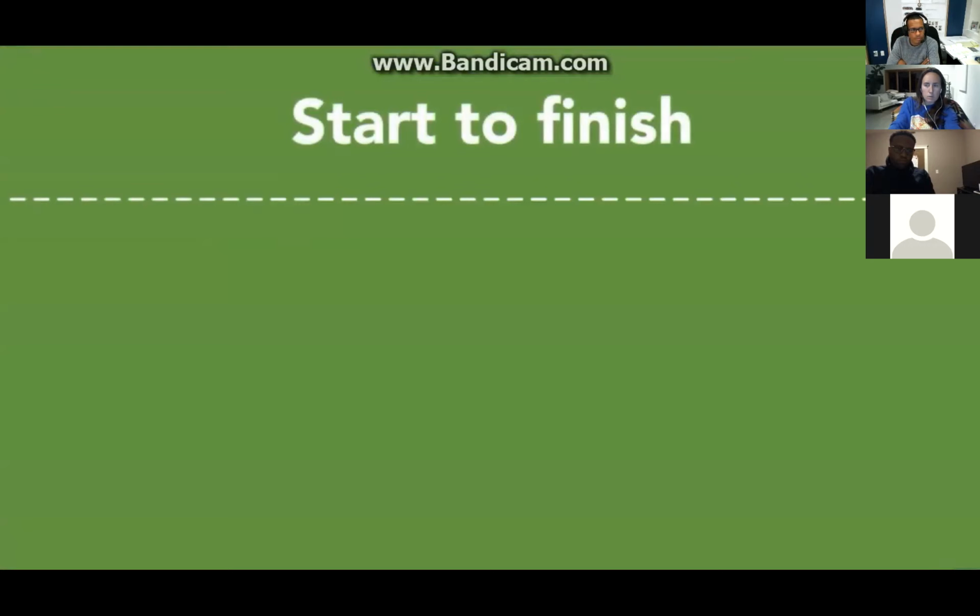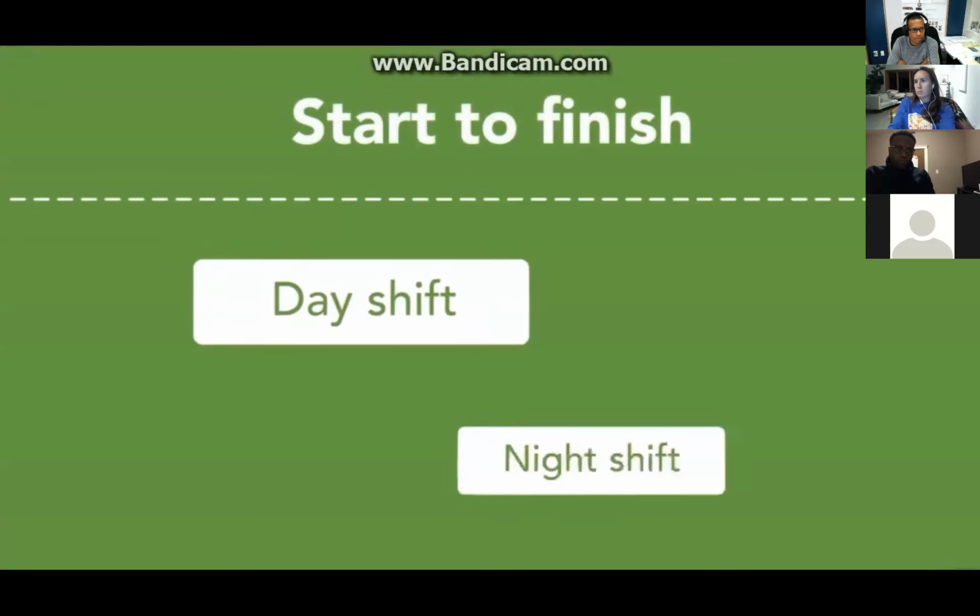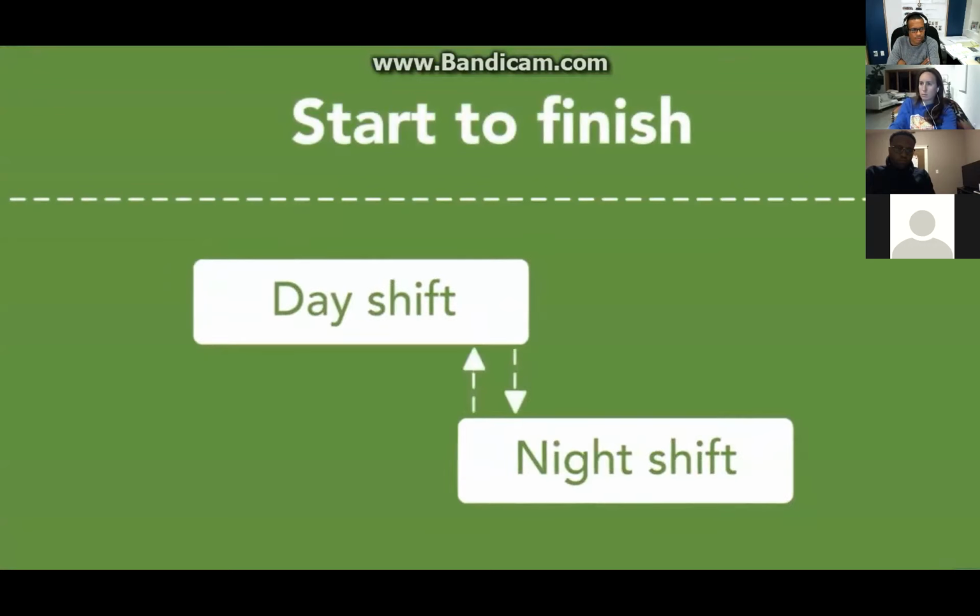And finally, a very rarely used connection, start to finish, where one thing can only finish after something else has started, like a shift handover or something. But with all of these, it's simpler and better to use finish to start. Otherwise, your plan will just get too confusing.